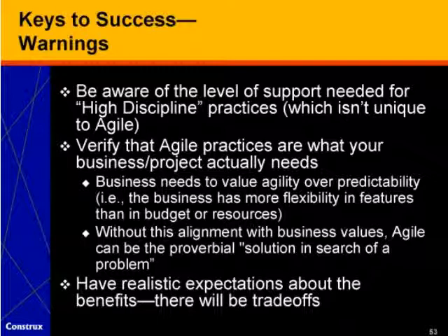Second warning is make sure that Agile practices really are what your business or project needs. If your business really values predictability over agility, and many businesses we have found do in fact value predictability over the ability to change your mind about your features, then you can make selective use of certain Agile practices, but you need to make sure that the specific practices you select are practices that support or enhance predictability, not practices that undermine predictability. And some Agile practices support, and some Agile practices undermine. So you need to be careful which ones you're picking.